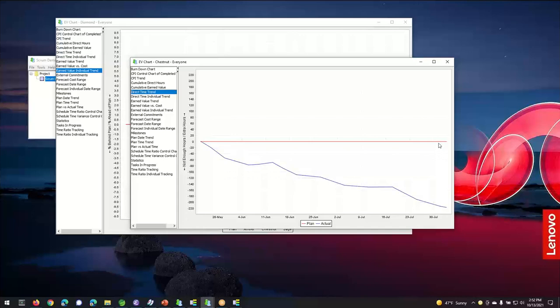Maybe they're getting pulled off on other projects, or maybe they're getting distracted by crises in production that they have to support, or maybe they're all senior individuals who have to provide architectural advice to other projects. But the bottom line is that they are not getting in the number of hours that they thought they would get. So basically their capacity is lower than they planned.